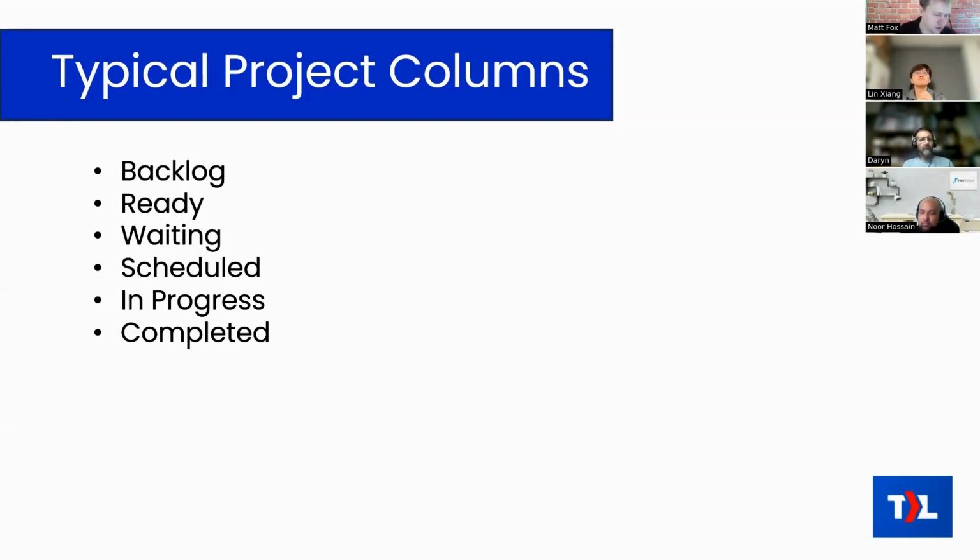So as I mentioned, you're not doing the typical triage process. Obviously, the biggest difference there is that in the first column, in service we typically call it new and not backlog, but the name itself doesn't really matter. The biggest actual difference here, though, is that in a project environment, it's okay for tickets to sit in the backlog for potentially quite some time, sometimes even months.